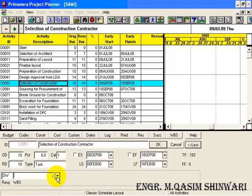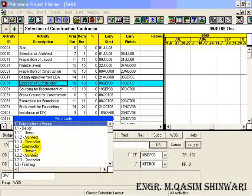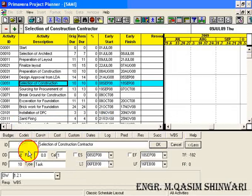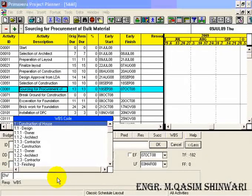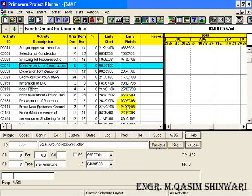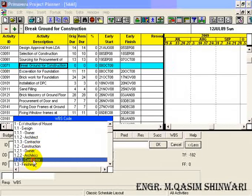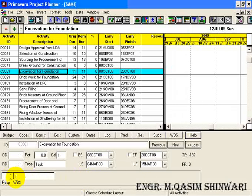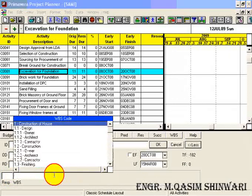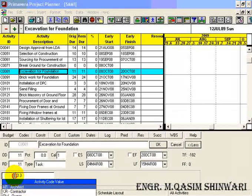Similarly, preparation of construction drawings lies in the responsibility of architect and is in the design phase. Design approval from LDA is the responsibility of owner and lies in design phase. Click on OK.